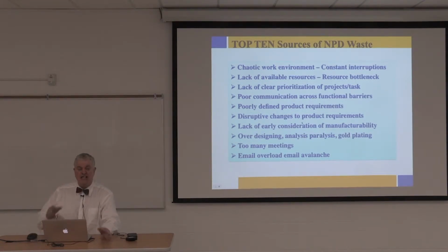But it's one of the worst things to just throw it through, take the order and not spend that upfront time and freeze the design. Because if that customer is not sure what they want and you're already in detailed design and they say, oh, I want the concept to change, you've got to go all the way back. It's a waste of money. Now they can do it, but you have to charge them for it. So these are rules that you need to set up front.